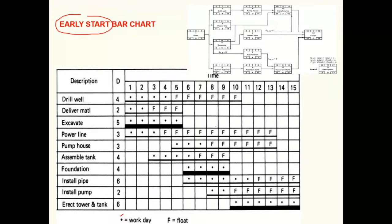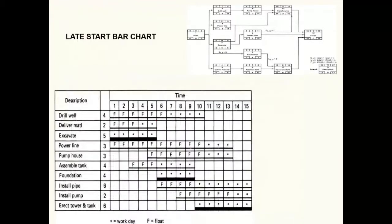Alternatively, the project manager could use a late start strategy, where the float is used earlier and work takes place towards the end of the project. This becomes very risky — if anything goes wrong in week nine there is no float to absorb the impact, and the overall project duration would increase. So utilizing float up front and doing work later is not a clever strategy. These represent the two extremes: early start and late start timings.